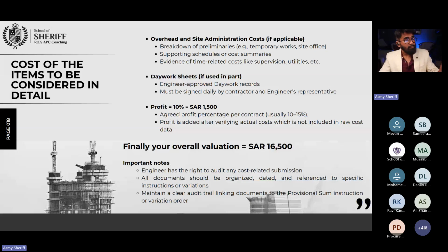And for any of those new items, right? We mentioned that for a new item it is actual plus profit. In that provisional sum, any item that you executed as day work, we will learn day work as one method. Use of day work, if I'm not wrong, rule number 5, we will learn. So if you use for a provisional sum actual work, actual item, and also a portion of the work on a day work schedule, then make sure that you have a record of day work and insert that too.